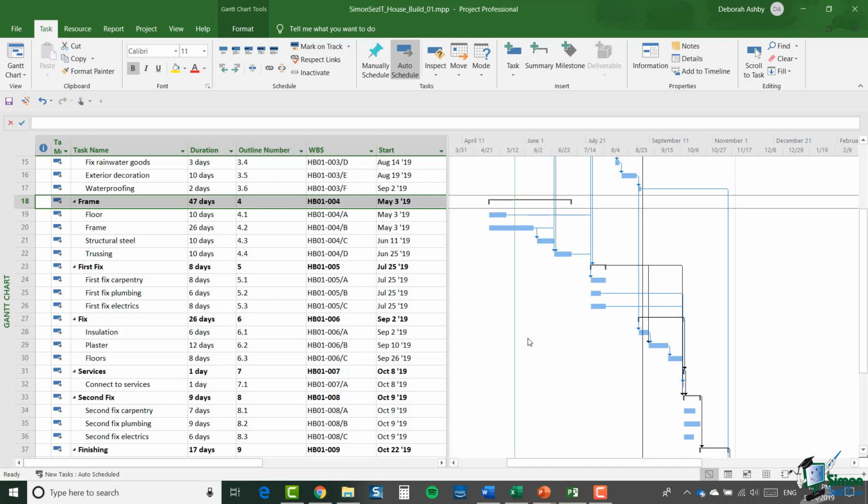So in a situation where basically my WBS codes are okay, but I may have the odd change to make, the odd addition to make, and so on, I can normally make WBS codes, and specifically custom WBS codes, work. So it's not a case that they can't work. It's a case that A, you need to make sure that you've done as much preparation as possible before you apply and customize them, and B, you may need to make some changes to those codes as you make changes to your plan in order to compensate for anything that Project 2019 does that you don't actually want it to do.